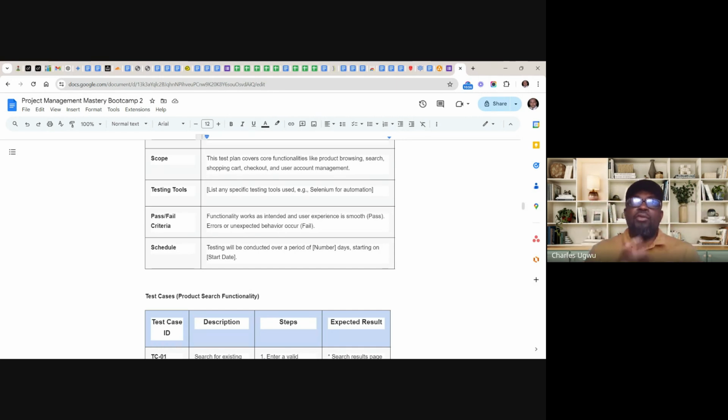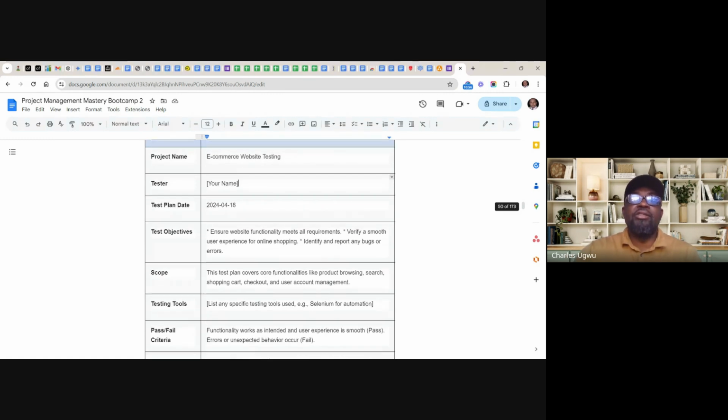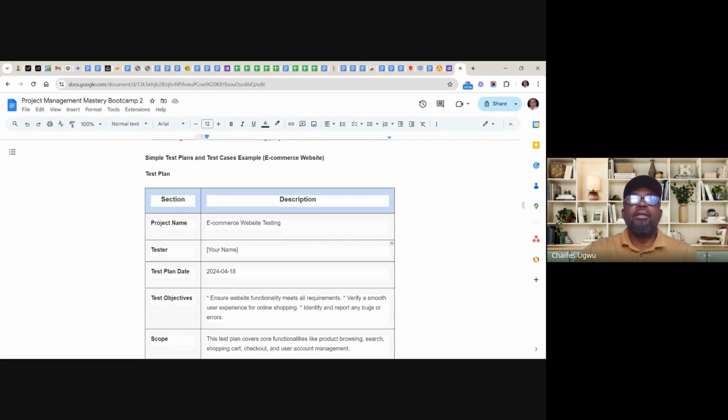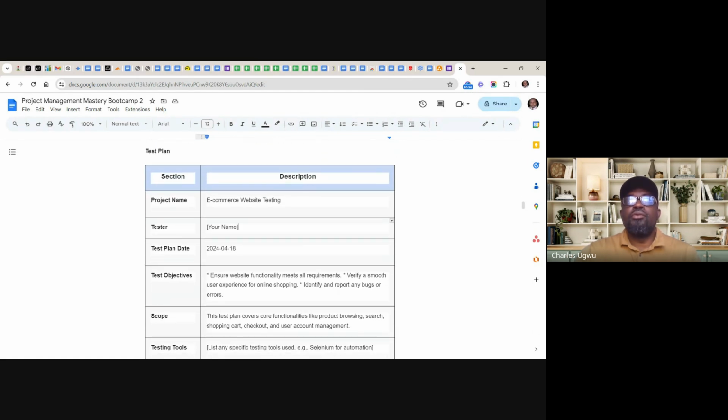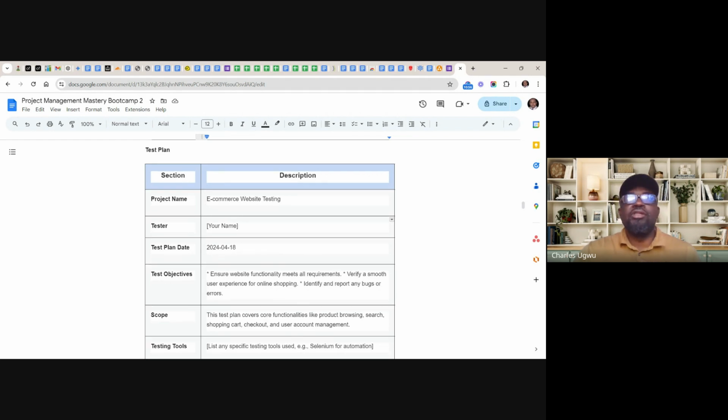We'll call this the test plan, so that whoever is involved in the testing knows what to do, the days, the plan of activities, the area to be tested, and the objective for the testing. Once you have a test plan, handing it over to the relevant tester or business analyst is not going to be difficult for the person to carry out his or her test.